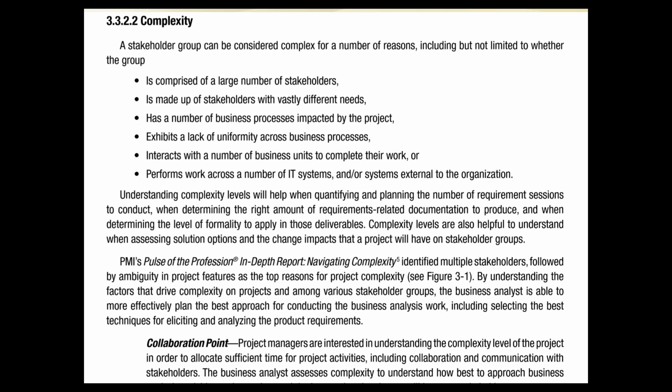Understanding complexity levels will help when qualifying and planning the number of requirement sessions to conduct, when determining the right amount of requirements related documentation to produce, and when determining the level of formality to apply in these deliverables. Complexity levels are also helpful to understand when assessing solution options and the change impact that a project will have on stakeholder groups. Naturally, if you have that kind of complexity defined, then probably you can do due diligence with that. You can give it more importance.